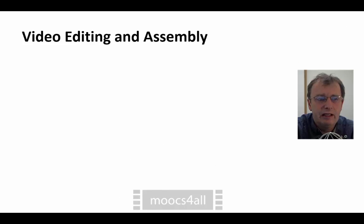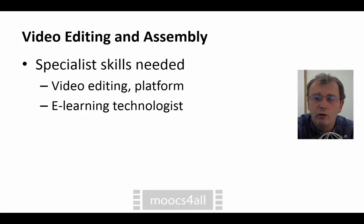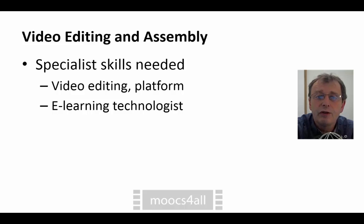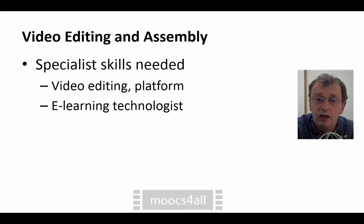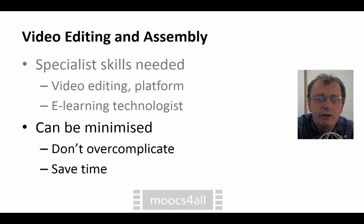Video editing and assembly is one of the other tasks, and specialist skills will certainly be needed here — in the video editing tools and for loading onto the platform. Some of these tools will be needed for other types of content other than video. So it's most likely that this is best done by an e-learning technologist who does quite a bit of this work and can develop a critical mass of skills. Even though we may use someone somewhat specialised, we do want to keep this as simple as possible — professional videos, but don't overcomplicate it because it will become a time sink and an expensive process.